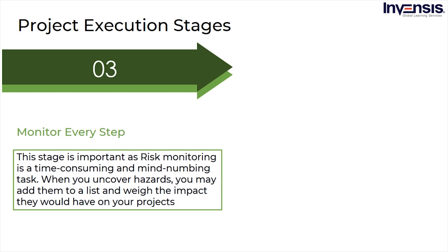That is why you must prepare for risks and have a plan in place to deal with them when they occur. For example, if you have a small staff, a sick employee might throw a major wrench in the works. If your team works from an office, there's a possibility that a fire will cause weeks of downtime. Preventing and managing these hazards is best accomplished by interviewing stakeholders to learn about hazards that have harmed the organization